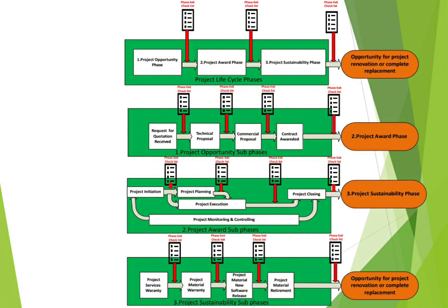All of this you need to check during the project closing. Also, you need to prepare the list of the lessons learned during the execution of this project. It is better for this list to be available since the beginning of the project, so that it is filled and monthly reviewed and updated based on the lessons learned during the project. Once all of this is done, you need to proceed with the project closing, where you will have the phase exit checklist,